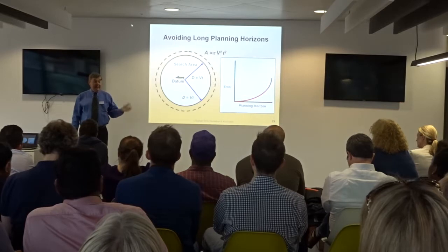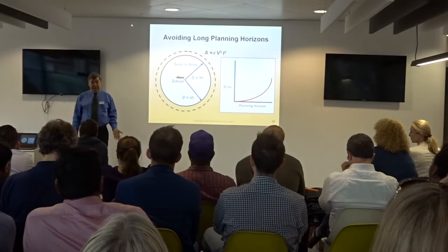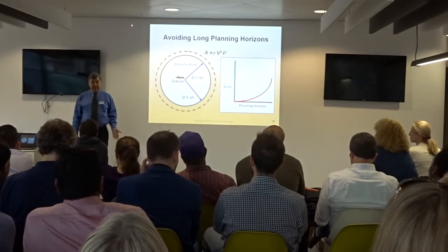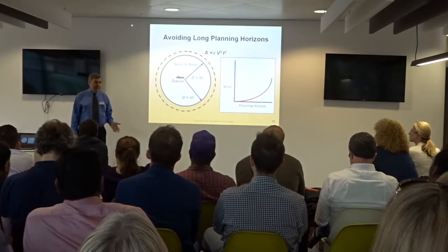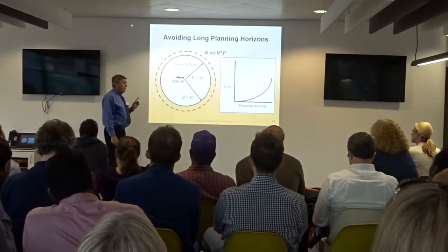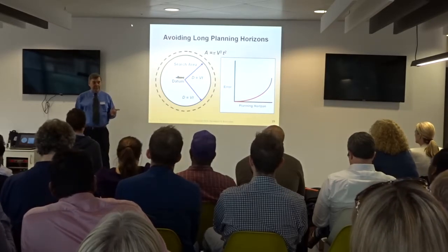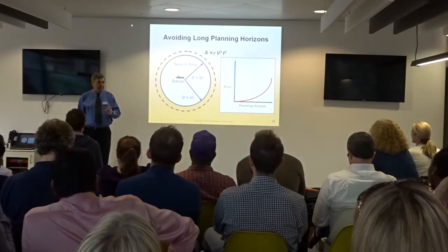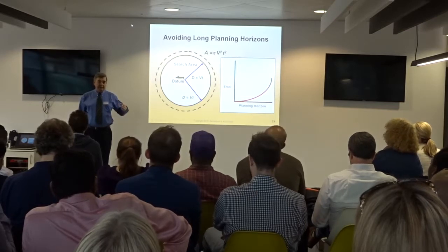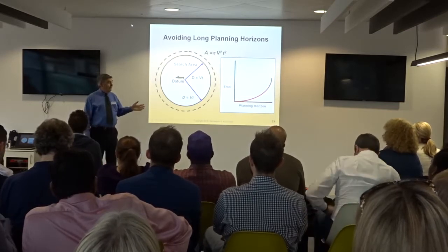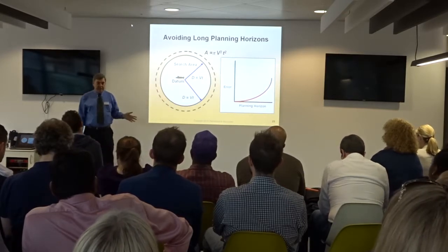Because I said, in the reality in your sector in the telecommunication space, nobody can forecast requirements at a 3-year time horizon. Everybody can forecast requirements at a 6-month time horizon. The biggest thing, and it's worth noting, is that the majority of projects fail because they do not meet the market requirements. It's not because they don't work technically, it's because they have the wrong market requirements they are designed to. That's the primary cause of failure. And that cause of failure goes up exponentially when you have long cycle times.